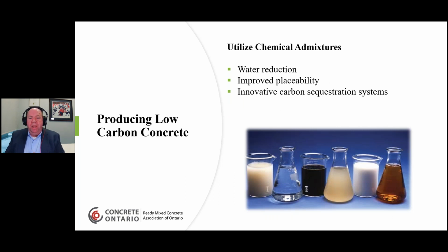Last major issue, chemical admixtures. They've been a huge benefit to the concrete industry. There's huge optimization options for this, but it's dependent on schedule, it's dependent on weather conditions, and it's dependent on the amount of time that it takes to place the concrete. There's a lot of factors on the job site. The flexibility of concrete is the fact that it's a plastic product shipped out to the job site that takes whatever form you can envision, and then over hours it gains strength to the point where it can both support itself and then support the loads that are applied to whatever it is you're building.